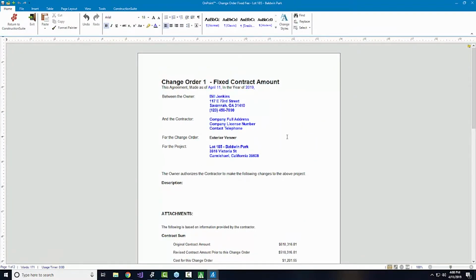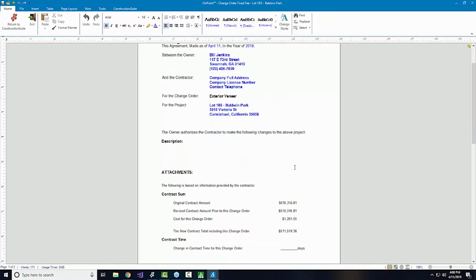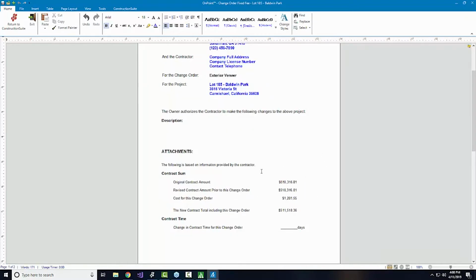Absolutely. And in this case, though, drawing up those contracts, it does the one most important thing for these when you're talking about change orders to your customers. It shows them, or it highlights the impact that we're looking at. And so it's keeping them up to date, or it's keeping them in the know. So if the customer in this case, be they a company or a future homeowner, whoever it is, if they have a $500,000 budget, and they're already stretching it a little bit with the contract in this case, if they start to see this new contract total climbing, they might turn down some of these changes because it's not the right time.